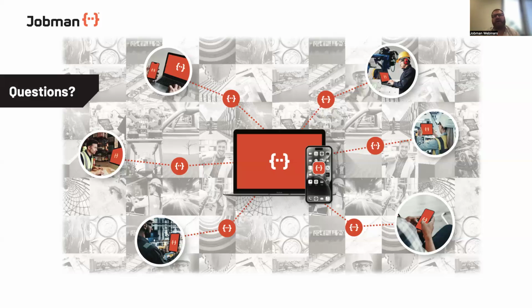So the only one use case I could think of is the substitute concept. One of the great things about the way we've set up our software is, and I'll use that Blum as a perfect example, where you have a particular hinge, a soft close hinge, and it has a supplier SKU, but you might source it from Lincoln Century, you might source it from Wilson Bradley, you might source it from Blum. So building what's called a generic quote pricing option, not available to order, and having that sit there so that it can be fielded out to the substitutes to allow for some automation in your purchase ordering inventory makes a lot of sense. However, even then, I would still use the SKU of the product on the non-orderable material.